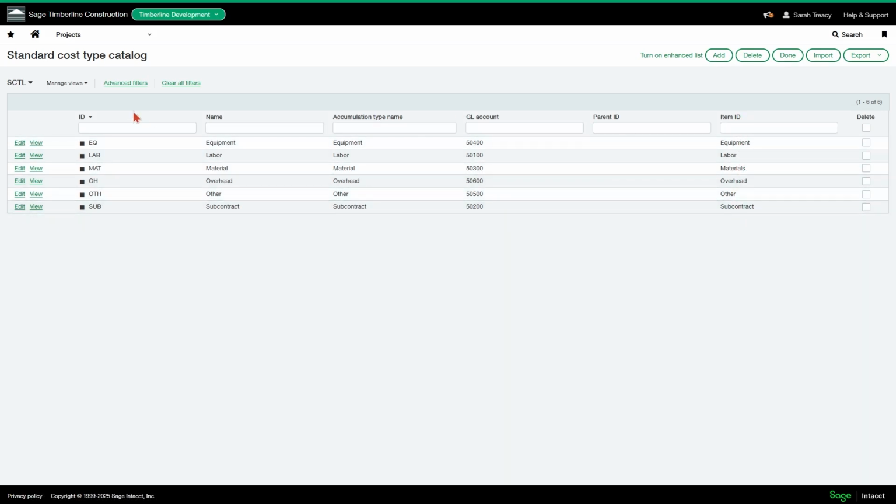Basically, you have your projects, your cost codes are assigned to your project to break down that cost. And then within your cost codes, you have cost types to further break down those costs. So it's all really in an effort to get your reporting as granular as possible.